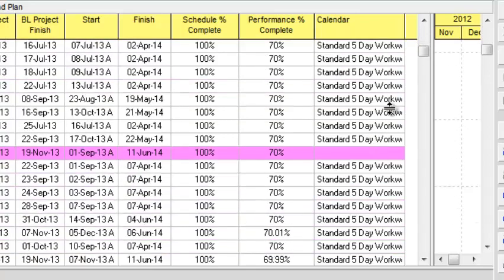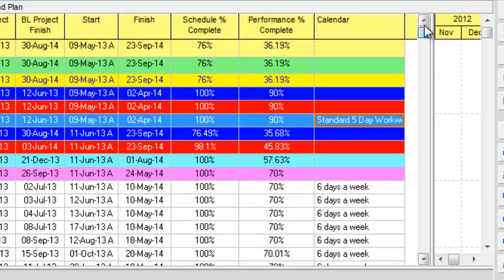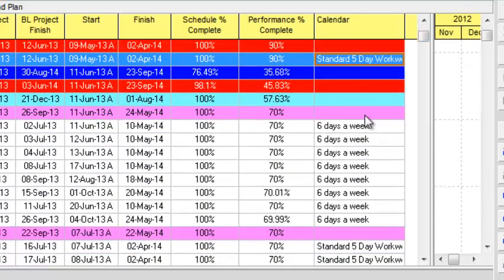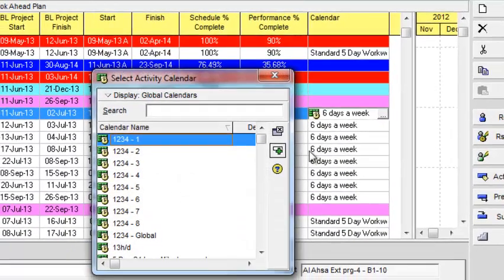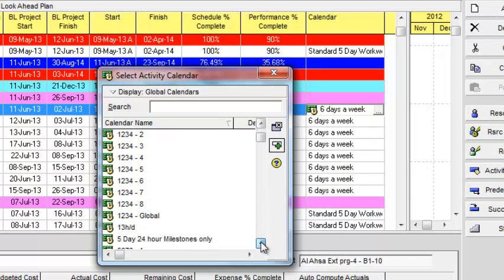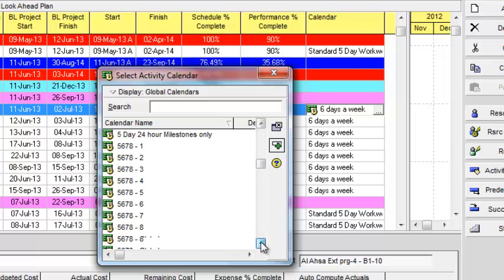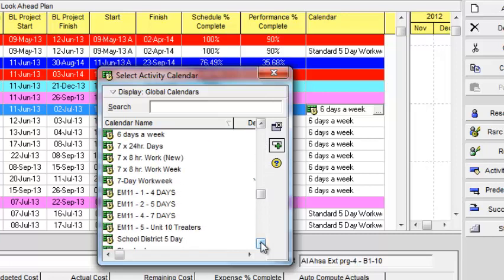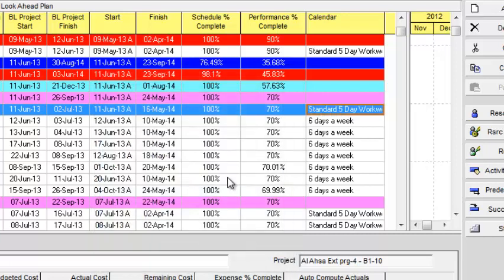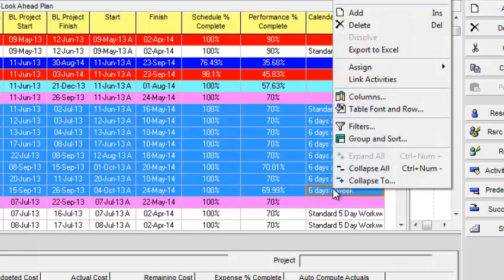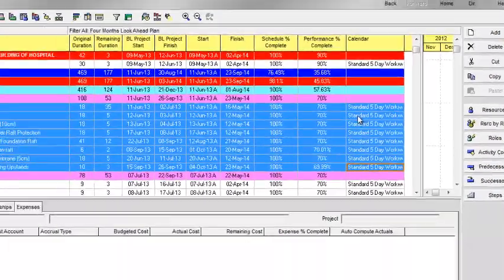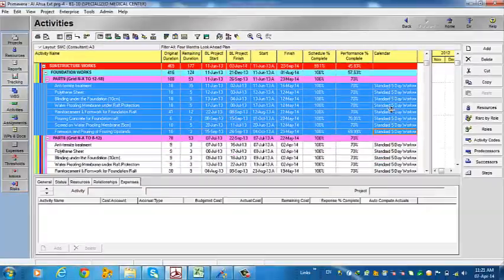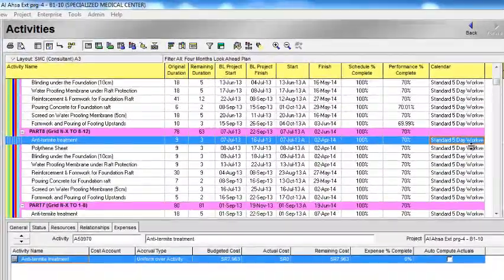Now I want to change this area to five days. I will change its calendar to the standard work week. I will select the last activity of this WBS by pressing shift. Now all the activities are selected. I will right-click and fill down. The calendar in this WBS is changed in seconds.